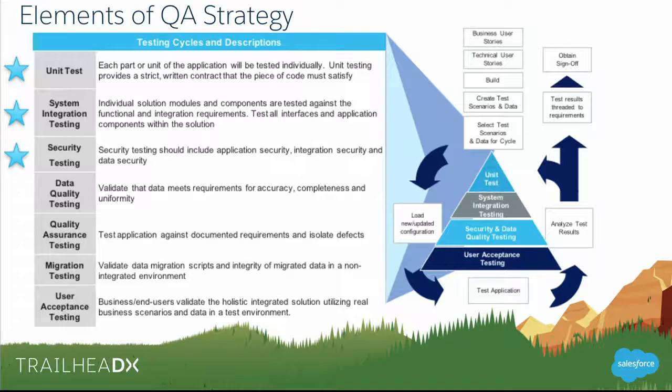So on the project I'm referencing, we presented a high-level design, detailed design to the quality assurance team. We said, yep, it's going to take us 500 hours to build this out. And they said, great, it's going to take us 4,000 hours to test it, right? From a profile, role, permission set, record type, field level security, all of those factors included.